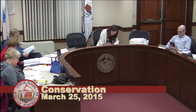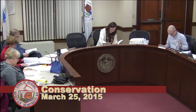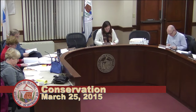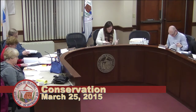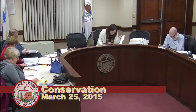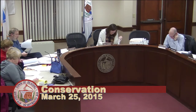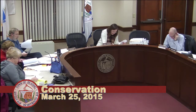Yeah. Okay. Number 16 on page 14, sorry to talk. Equipment, materials, those are the first two words I have a concern about. Fuel storage and refueling, fine, that's fine. We can do that 100 feet away from the boundaries of the wetlands. But the site is within 100 feet of the wetland. So equipment to do the work and incidental materials used in the building can't be located more than 100 feet away.